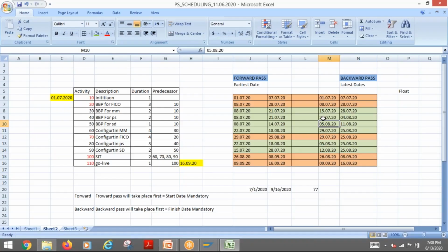Then how do you know what was my initial plan and what is the latest plan? For that they have a concept called baseline. In SAP we have a concept called version, which I have not gone into yet, so we need to cover that first. So there are differences between the software. We cannot say it is apples to apples, but almost similar functionalities are available.